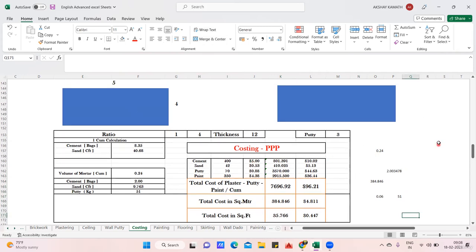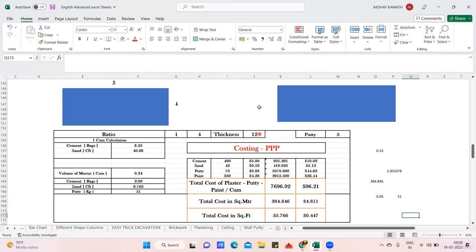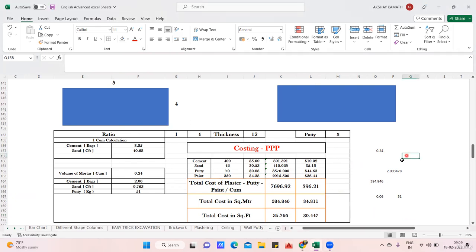Try to prepare this Excel sheet so you can do the costing yourself. I've explained how to find cement and sand quantities, paint quantity, and wall putty quantity. After this, we just need to create a bill of quantities or abstract sheet — multiply the quantities by the rates to get the total cost. Practice this and once you understand the concepts, you can take out the rates required. See you in the next lecture.